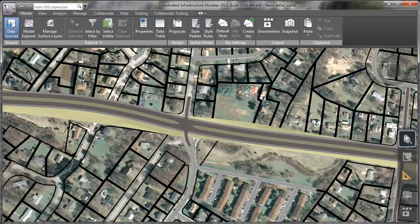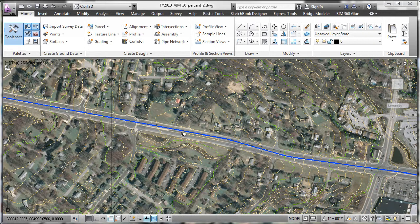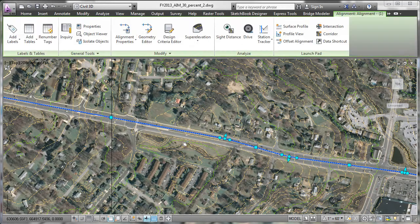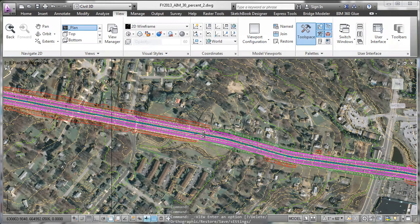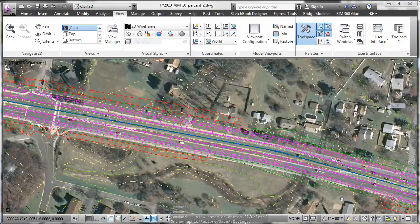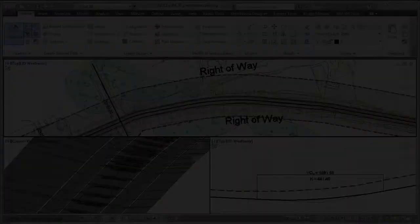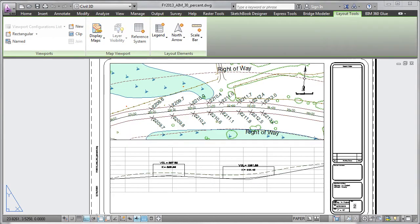The Preliminary Design Model elements can be brought into Civil 3D in order to create the exhibits that are often required for 30% plan submittals, including approximate right-of-way plans, plan and profile sheets, and first-run cross-sections.